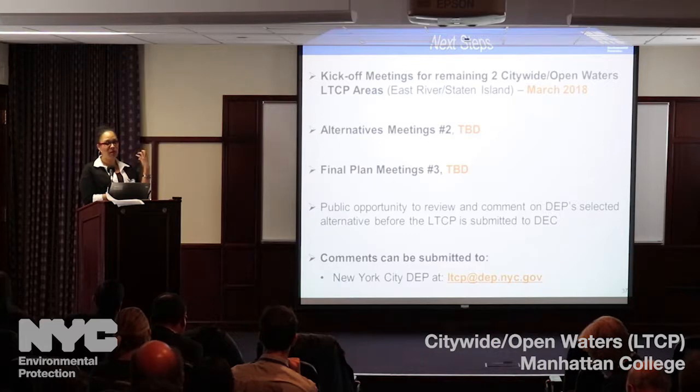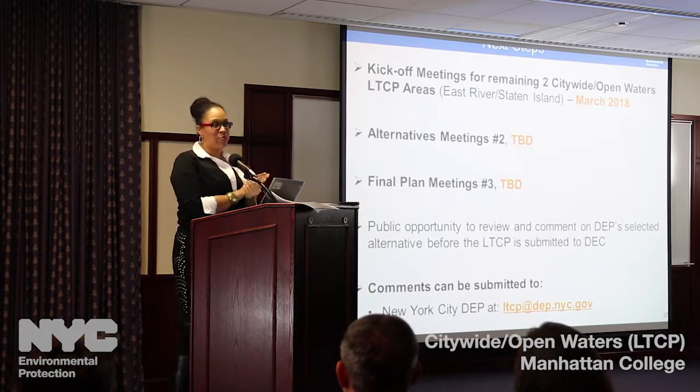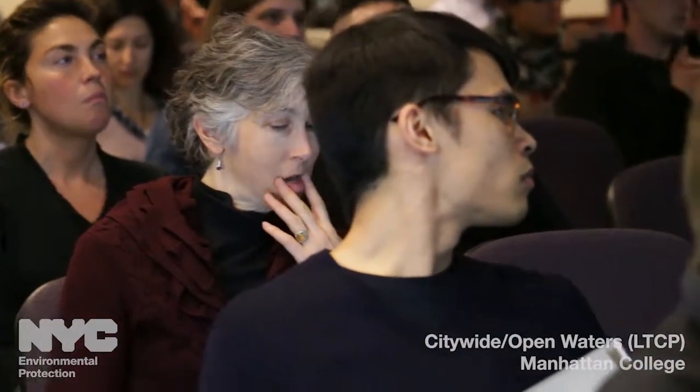As Keith mentioned, we'll be going through all of the different steps in terms of modeling and looking at different alternatives, and we'll come back to you to discuss those alternatives, the ones that you've shared with us, and our assessment of those. We'll be able to get more feedback from you at that time. Then as we select our final LTCP, we'll come back and share that final selection with you. You'll have an opportunity to review the selected alternatives and provide comments to us. We'll respond to those comments and make changes as necessary before we submit that plan to the state.